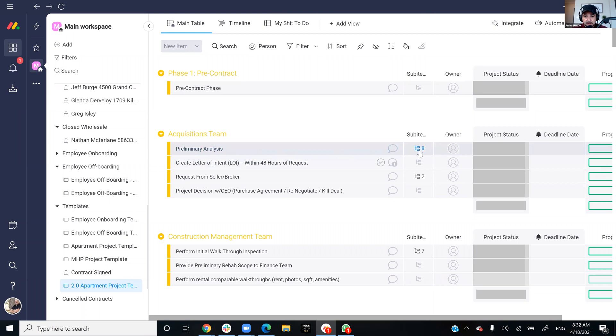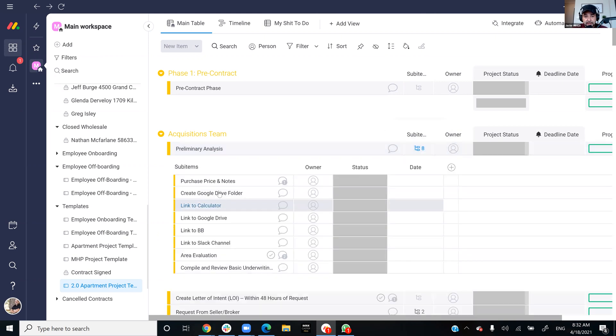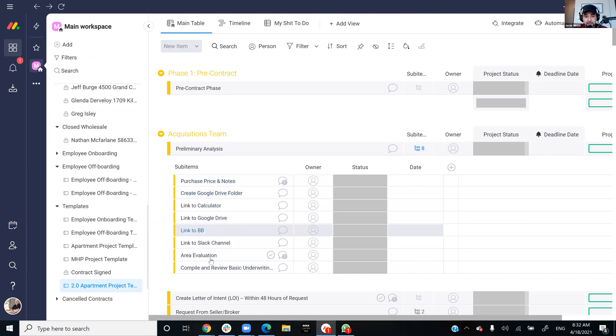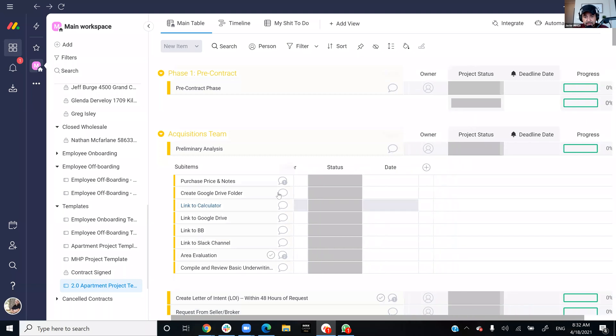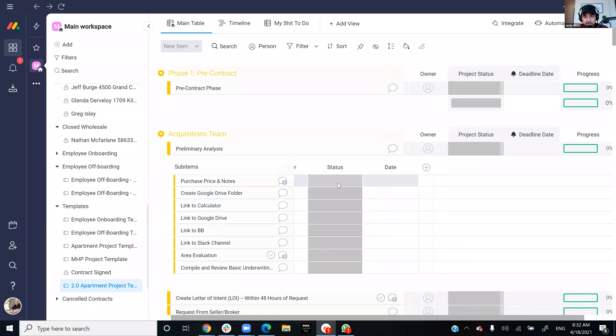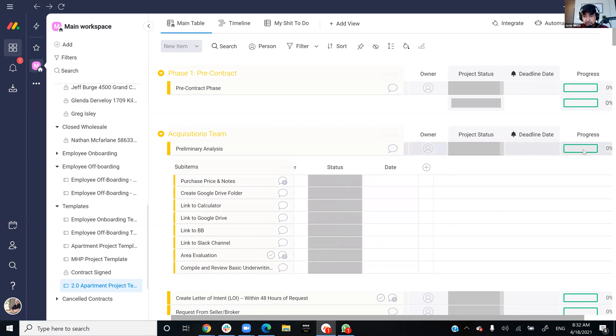Analysis. And when you click here on the expand, the sub items, you click on it and it has other items to do. Like this is our items that we do. And then you can give somebody ownership of that so everybody is on the same page. And if they've checked off like four of these, there's eight sections here, the progress will go to 50%. Then you can put a deadline.